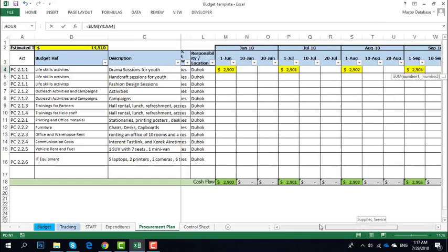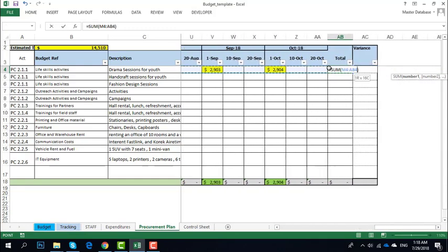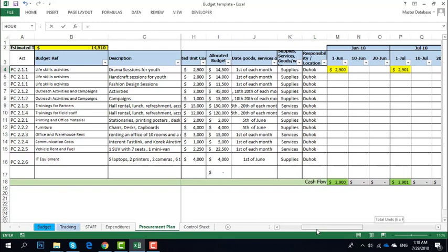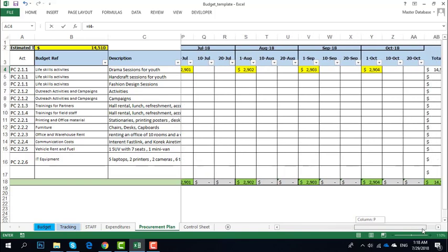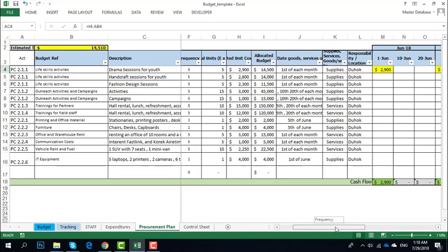No, it's from the beginning. Yes. Now 14th, and then I go down. Okay, the variance equals the main budget minus the total. It's 10. So we are overspent by 10. We need to go back to see why this happened.